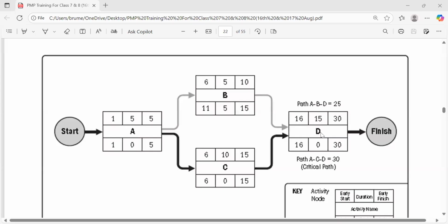Now you want to finish within 15 days. You carry D back to where A is and say, A, I want you to start at the same time with D. Both of you should have a start to start relationship, right? So as soon as we start A, we start D now. When we are done with A, D could have gone 5 days, right? When we could have been through with C, D could have done 15 days, right? And there remained no activity, right? So the project duration, instead of 30 days, is now how many days? It would be 15. Yes.